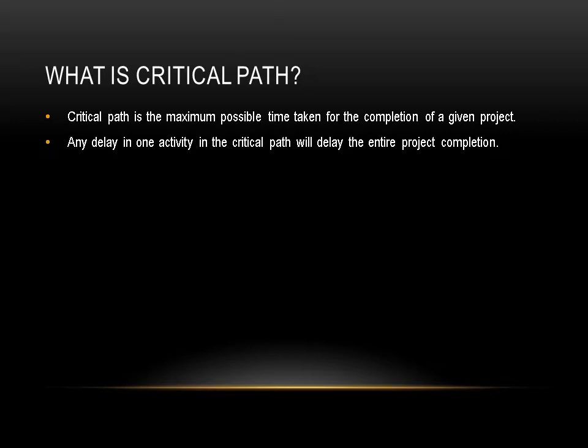You might not get clear about this, like any delay in one activity in the critical path would delay the entire project completion. When I show you the critical path, I will explain how delay in even one of the activities in that critical path would delay the entire project. Here, what is critical path? Most of the students make a mistake in this.